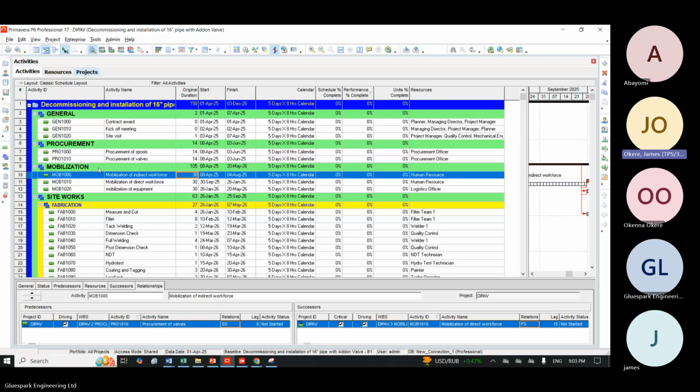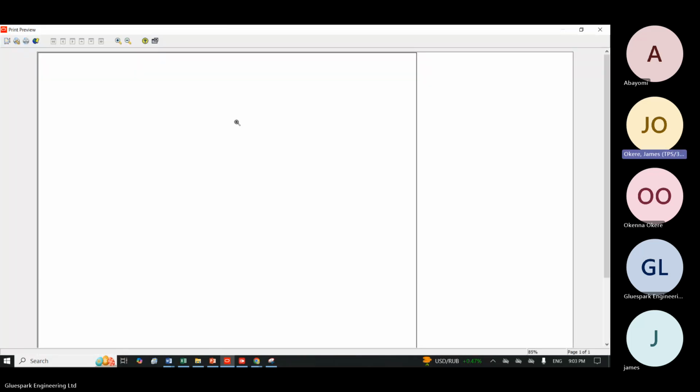And like I said, for the class and small reports you'll be sending in your organization, you will use the Snipping tool. But for reviewing your schedule or official report, you will use PDF. So to put it in PDF, we have done the Snipping tool, we are now looking at the PDF. First step, click on File, click on Print Preview. When it opens this screen for you, you click on Page Setup.